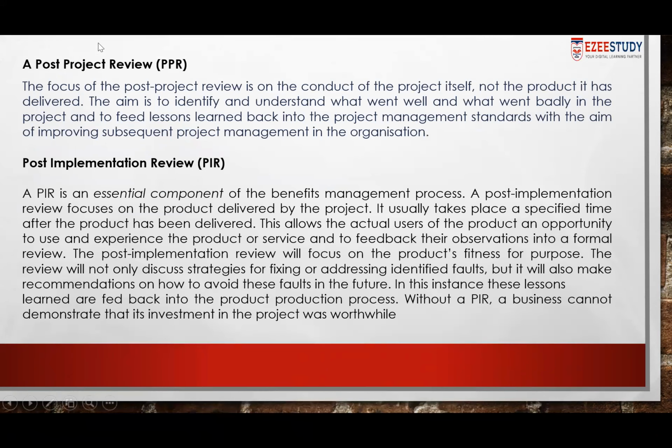So once a project is completed, then there will be a post-project review. But you can see there are two similar-looking things. One is a post-project review, and the other is a post-implementation review. Now, a post-project review is basically conducted after the completion of the project, and this review is about the conduct of the project itself, and not the product it has delivered.